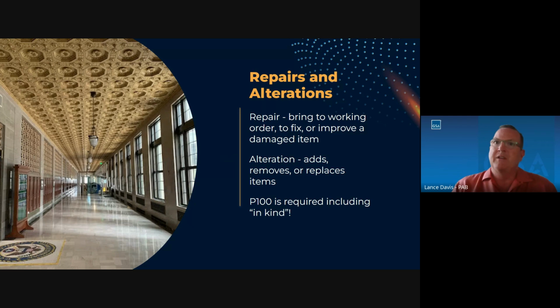So, all right, repairs and alterations, and this sort of gets into what I was just saying. We've tried to be very clear on what a repair is and an alteration, but in both cases, P100 is required, including in-kind work. We get this term used a lot: "Oh, we didn't realize P100 was required. We were just replacing in-kind." It is. So please be aware of that and make sure that you're bringing the latest and greatest.